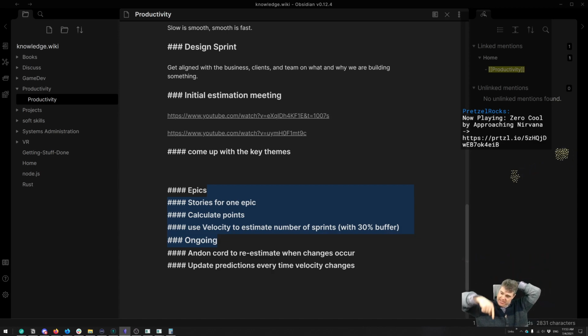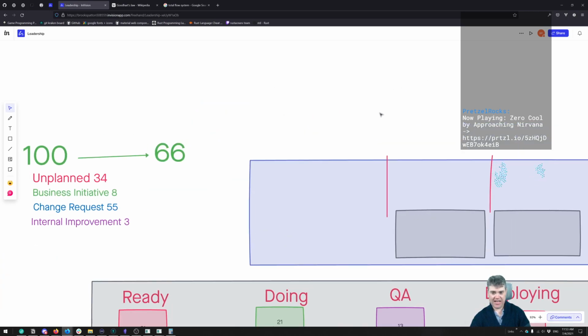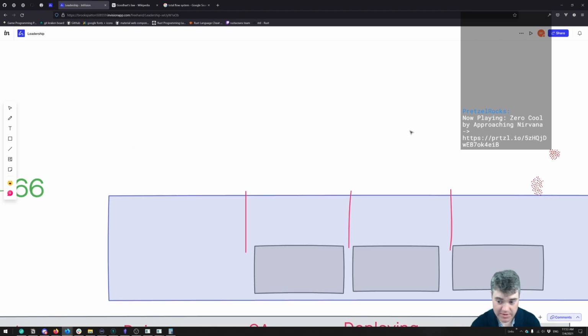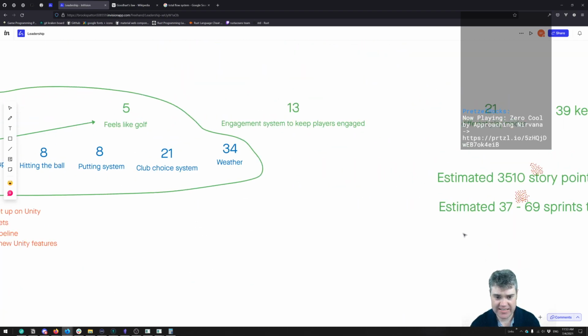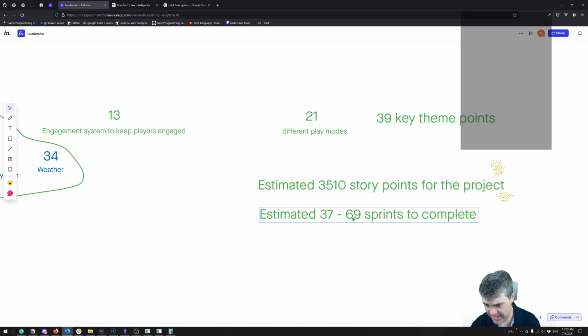Now every sprint, take a look at your velocities. If your adjusted velocity changes very much from this number, then you can start realizing, hey, suddenly we're at 55, and it's going downwards, or if it's going upwards. Just spot check every couple of sprints, maybe even every sprint, and recalculate based upon these numbers. Are you still going to hit within here?